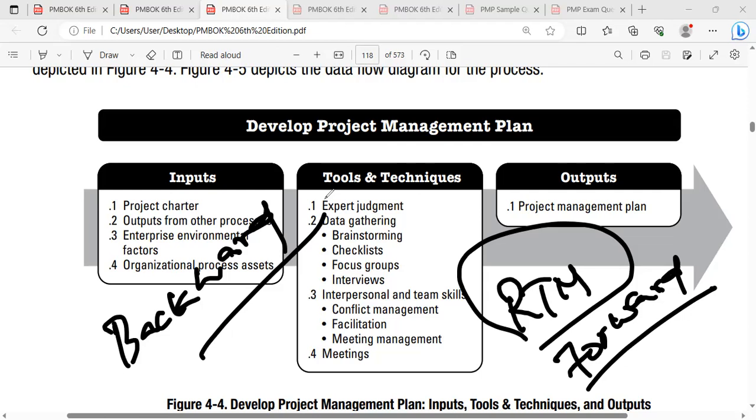You can see even the acceptance criteria in the requirement traceability matrix. You need to get your acceptance criteria signed by the stakeholder. If the stakeholder is not accepting, open the requirement traceability matrix. Why is he not accepting? What is the reason he is not accepting? Make sure our team gives clear justification to the stakeholder, and the stakeholder will understand. Because 4 years back he asked you to remove it. 4 years back he asked you to modify it. 4 years back he asked you to go for changes. That information will be clearly tracked and traced and kept in the requirement traceability matrix.